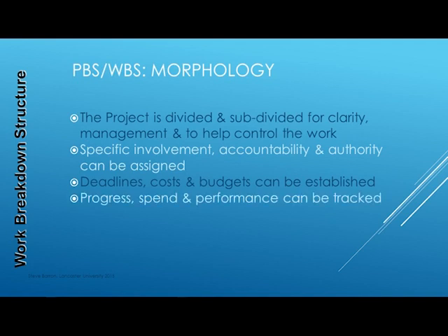Defining specific outputs from each activity, the expected standards of completion and associated costs and deadlines allows monitoring of progress as the tasks are satisfactorily completed. Progress monitoring must compare planned expectations for each activity with measures of achievement, timeline, spend or resource usage, and actual achievement of quality. Thus, the performance of the project team can be assessed, leading to decisions and actions taken that revisit project outcomes, costs and deadlines.